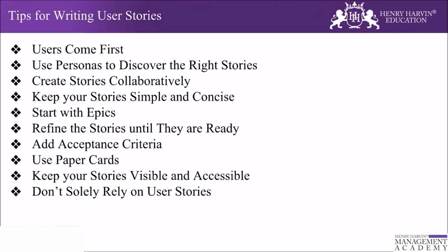So you can take this approach further and write user stories collaboratively as part of your product backlog grooming process, and this leverages the creativity and knowledge of the team and results in a better user story. So if you can't involve the development team in the user story work, then I think you should consider using another more formal technique to capture the product functionality, such as use cases.